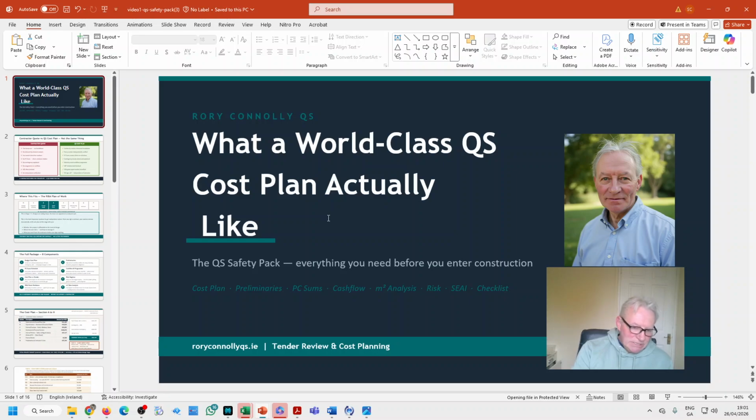So for a complete world-class cost plan, those two need to be mirrored, but that in itself is not enough. You need to take in the environmental factors and examine them, and then you need to take the subjective nature and any red flags that are possibly seen at this stage, and you need to flag them. So it's a lot more detailed than square meterage multiplied by units, put into a template and spat out. It's way more than that.